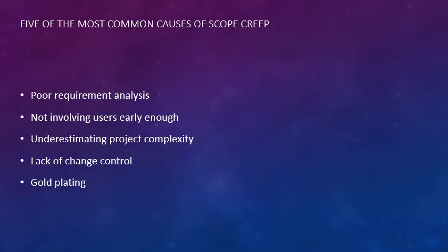Running a lot of projects through Capstone, a lot of the times the clients, as things go along, will go, oh, well, it would be really nice if we had X, Y, Z. The problem when you get to fourth year and you're doing Capstone is it is a 12-week process in one semester with limited financial resources. So when those people say it would be nice, but if we do X, we have to give up Y.